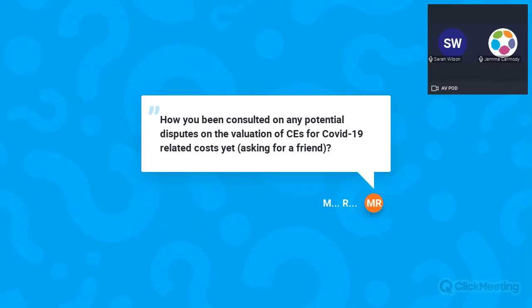So kind of March, April last year, I spent quite a lot of time speaking to people on the phone, telling them what notices they had to submit to protect their position, what evidence to have, so that if it became problematic, they had everything ready. To have some decent negotiations, but if all else failed, to adjudicate if necessary.